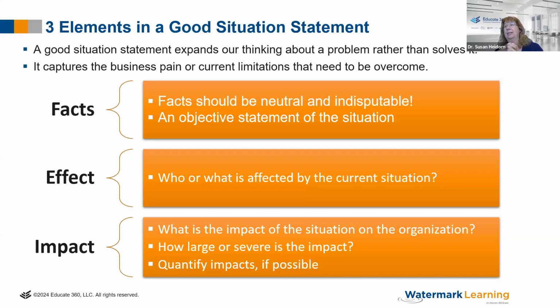Impact, what's the impact of the situation? So what? We got 10 customers complaining. Okay, so what are we going to do about it? Is it important? I don't know, because I don't know how big it is. Like I said, if it's 10 out of 10 million, yeah, maybe. Or if it's your 10 top customers that give you the most revenue, important.